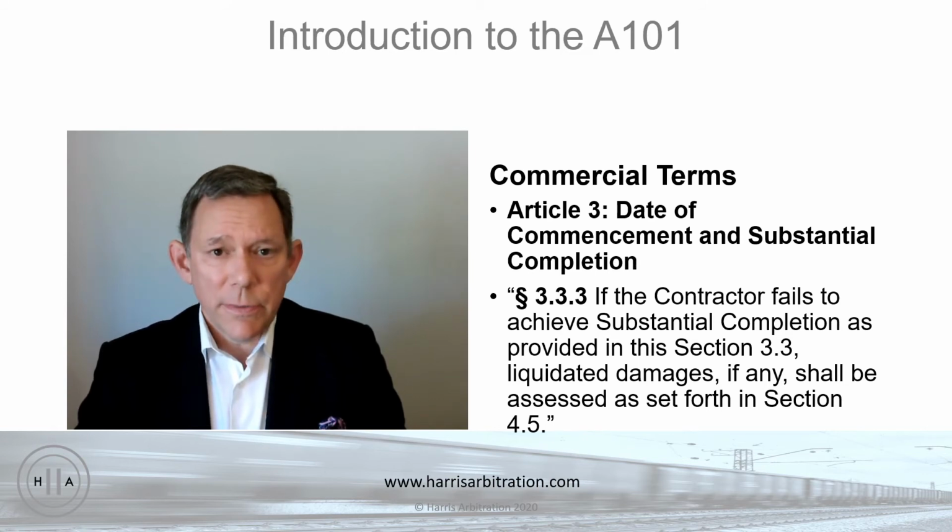And so the doctrine of substantial performance developed as a way of avoiding forfeitures. And basically the doctrine of substantial performance was, well, if the contractor has substantially performed the contract, then the condition to the owner's obligation to pay will be deemed to have occurred, and the owner will have to pay the contract price less any damages that the owner can prove have flowed from the contractor's failure to fully perform.